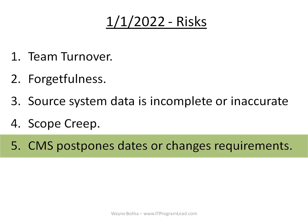Point number five: what will you do if the CMS postpones dates or changes the requirements? This happened when I was working on the ICD-10 program and you must be ready for this. How will you react if the CMS dates are postponed by six months? One option is to have software in production with the new features turned off so that you can make small production changes to implement the switch to turn the software feature on.